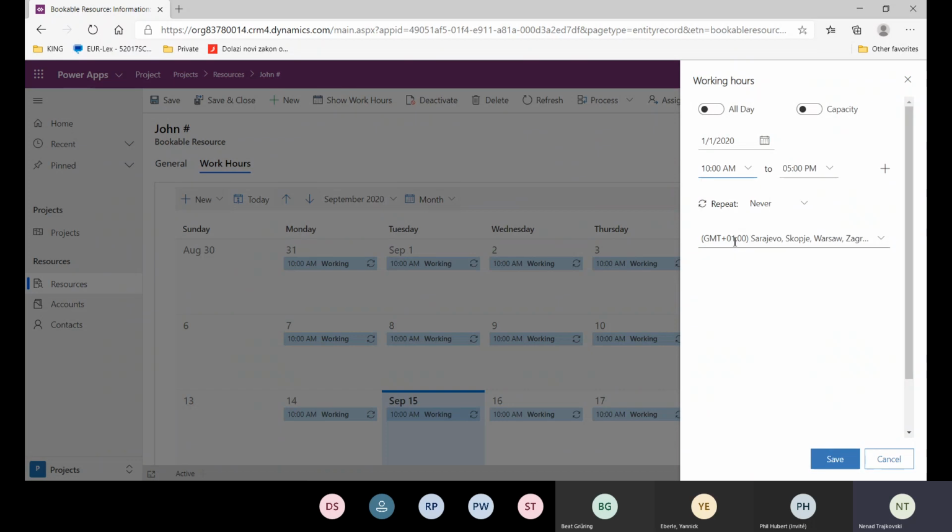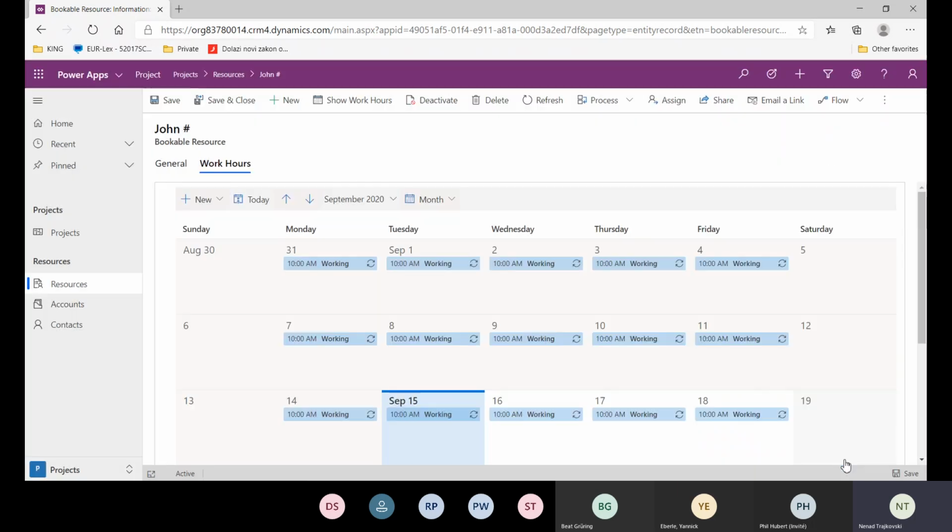And I will say, you, John, are going to work from 10 to, let's say, noon, which is 12 p.m. I will say repeat it every day, not on Sunday, not on Saturday. This is my work time. Okay, my time zone. I will say, okay, remember for John. Now, John is going to work from 10 to 12, from 10 to noon.